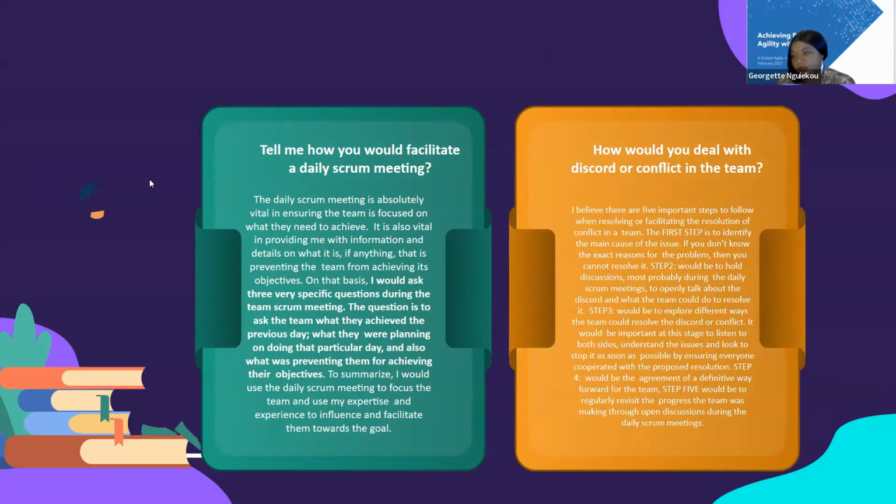Maybe you can say, during my daily stand-up, I always make sure that I log into my Rally or my Jira board 15 minutes before, going through the board to see what kind of discrepancy is on the board, and going through my email to see if there's any announcement that needs to be discussed during the meeting. So when the meeting starts, I pull out my Kanban board, and I read names based on the stories on the board, and they provide their update because they already know the quick questions that they have to answer.